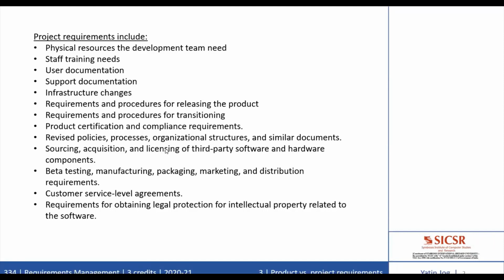Identifying these project requirements is a shared responsibility of the business analyst and the project manager. Both of them are responsible. They often come up while eliciting the product requirements. Project requirement information is best stored in the project management plan, which should itemize all expected project activities and deliverables also.